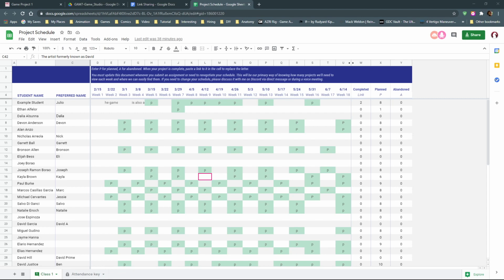One says, do you have advice for going about making an environment? When I try to attempt making one, sometimes I get overwhelmed. Yes, make assets for the environment first. So instead of making an entire environment, try to make a list of what might appear in the environment and make your first goal to make like a set of those objects.